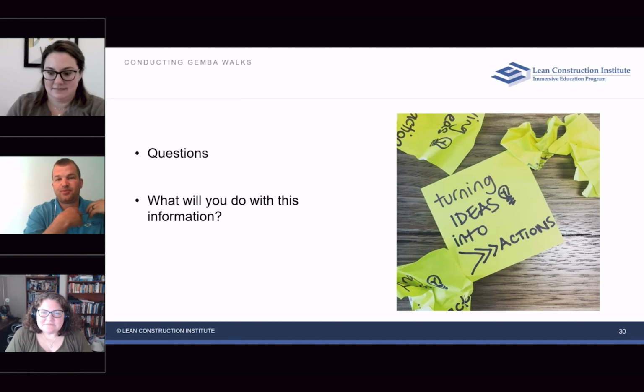Well, if you're a superintendent doing a Gemba walk, you should really have your weekly work plan in front of you, because the plan for the week is right in front of your face now, right? Is what we planned on doing actually happening? And then if it's not, start asking questions why, right?